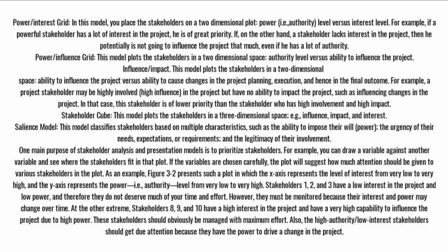One main purpose of stakeholder analysis and presentation models is to prioritize stakeholders. For example, you can draw a variable against another variable and see where the stakeholders fit in that plot. If the variables are chosen carefully, the plot will suggest how much attention should be given to various stakeholders in the plot. As an example, Figure 3.2 presents such a plot in which the x-axis represents the level of interest from very low to very high, and the y-axis represents the power, i.e., authority, level from very low to very high. Stakeholders 1, 2, and 3 have a low interest in the project and low power, and therefore they do not deserve much of your time and effort.